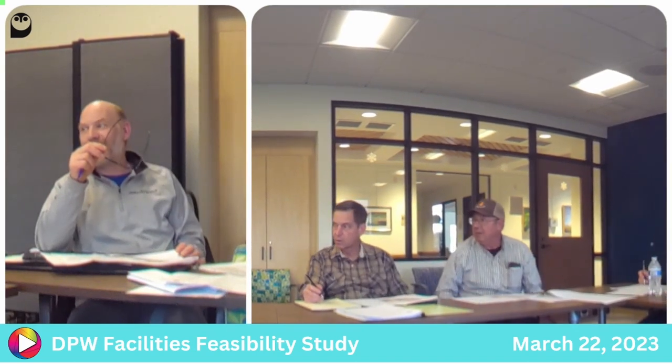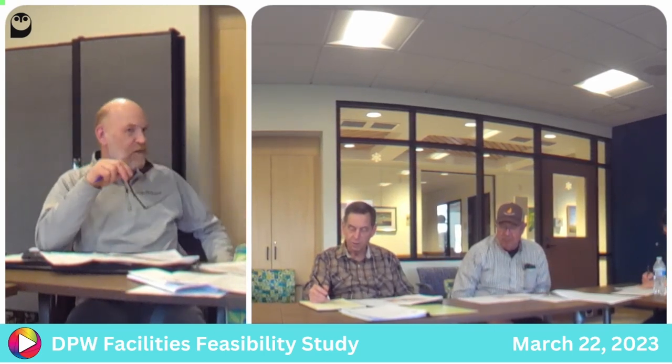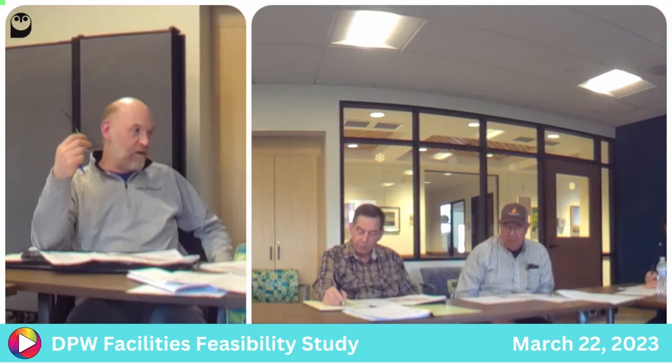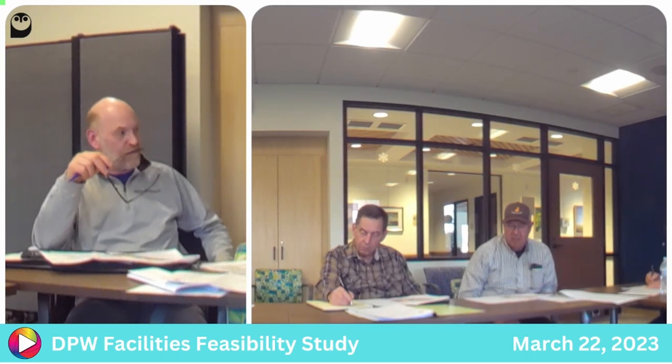The 5 million is his fee. Yeah. What is the 27, is the total project? Total project cost, so that includes, yeah, engineering fees, but all the other soft costs, including furniture and other IT costs, you know, access control and all that.